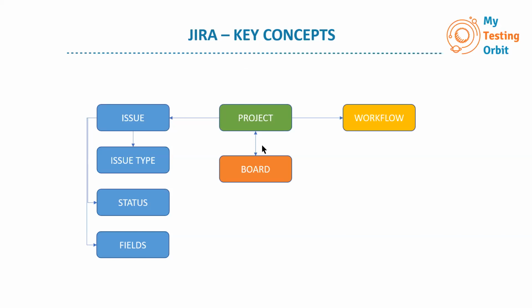Rupal is asking, in acceptance criteria, we write test cases. No, Rupal, acceptance criteria is not written by testers. Acceptance criteria is written by the product owner, or I would say the business analyst. But of course, even if the business analyst is writing the acceptance criteria, it's driven by the product owner, because the product owner is specifying what the customer is looking for. So acceptance criteria is part of the user story, and the user story is not written by the tester.